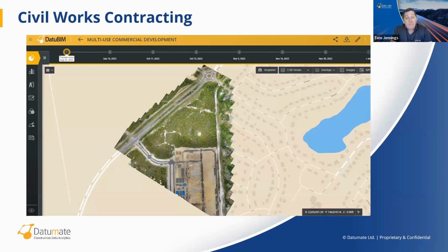To measure the volume of the new stockpile with removed dirt, they compare it to the number of trucks hauling the dirt down. This is used as a safeguard to ensure that none of the dirt is removed off-site unaccounted for during the project lifecycle.